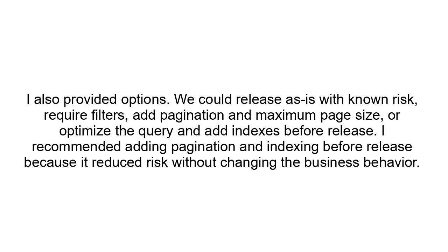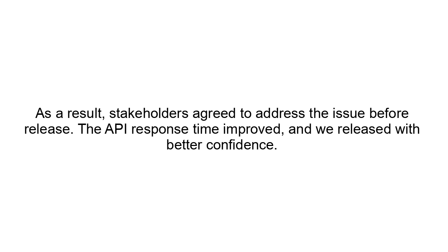I also provided options. We could release as is with known risk, require filters, add pagination and maximum page size, or optimize the query and add indexes before release. I recommended adding pagination and indexing before release because it reduced risk without changing the business behavior. As a result, stakeholders agreed to address the issue before release. The API response time improved, and we released with better confidence.